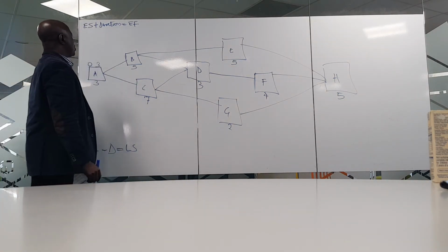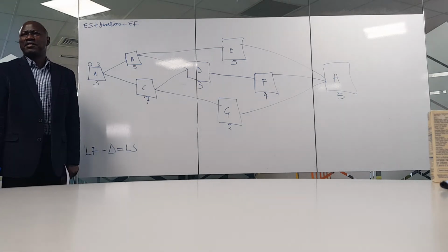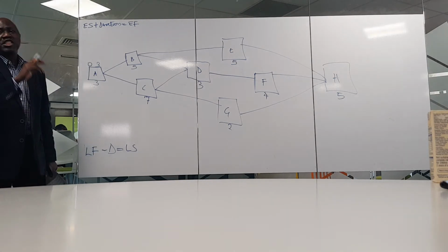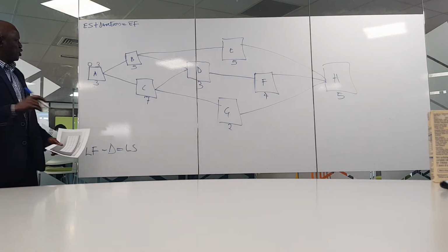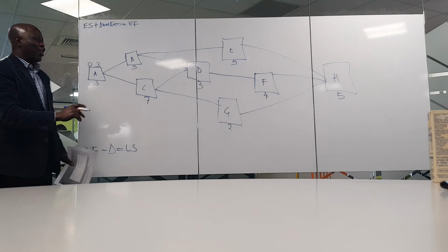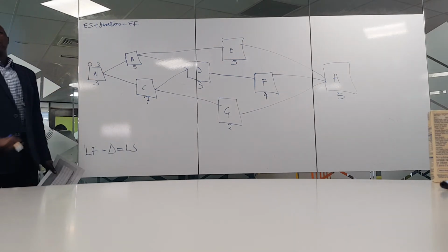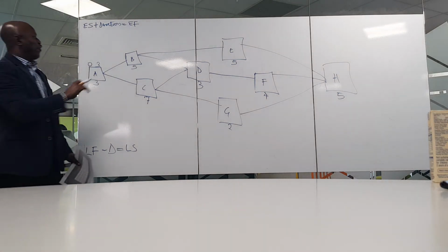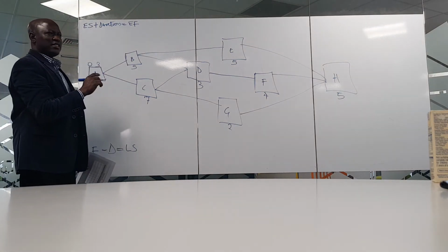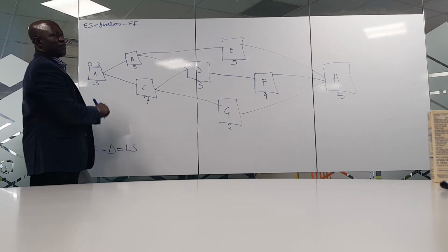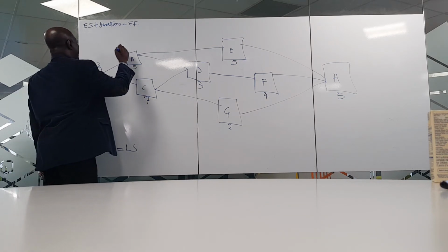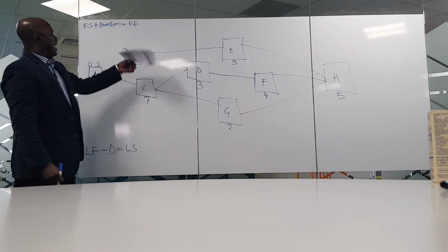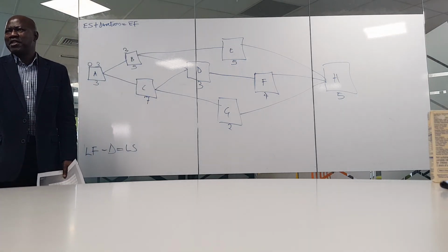Now we're going to this. LA start here is what? Why is it 3? B is dependent on A. Because B cannot start until activity A is completed. And activity A will be completed in 3 days. So for activity B to start, it will take into consideration the timing of activity A. So we can put LA start here, 3 days. LA finish here. How many days will it be?